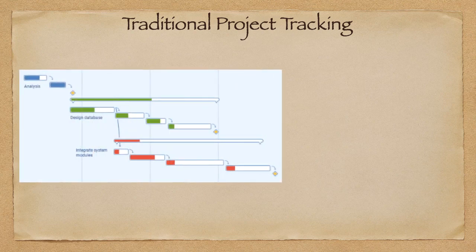So we usually have a Microsoft project plan, which is planned for maybe up to 6 months to 9 months or overall project duration. And the way we track the progress is typically based on milestones. So that means analysis phase is done, maybe 20 to 25% of the progress, and design is done, another 15 to 20% is done, coding is done, up to 50% done. So something similar to that we track.